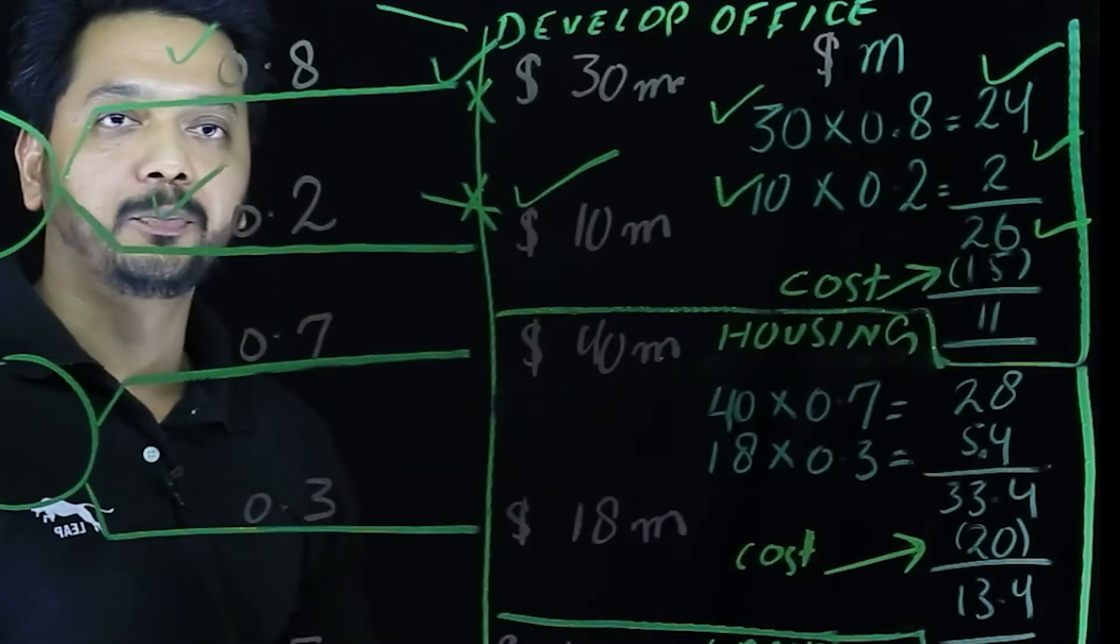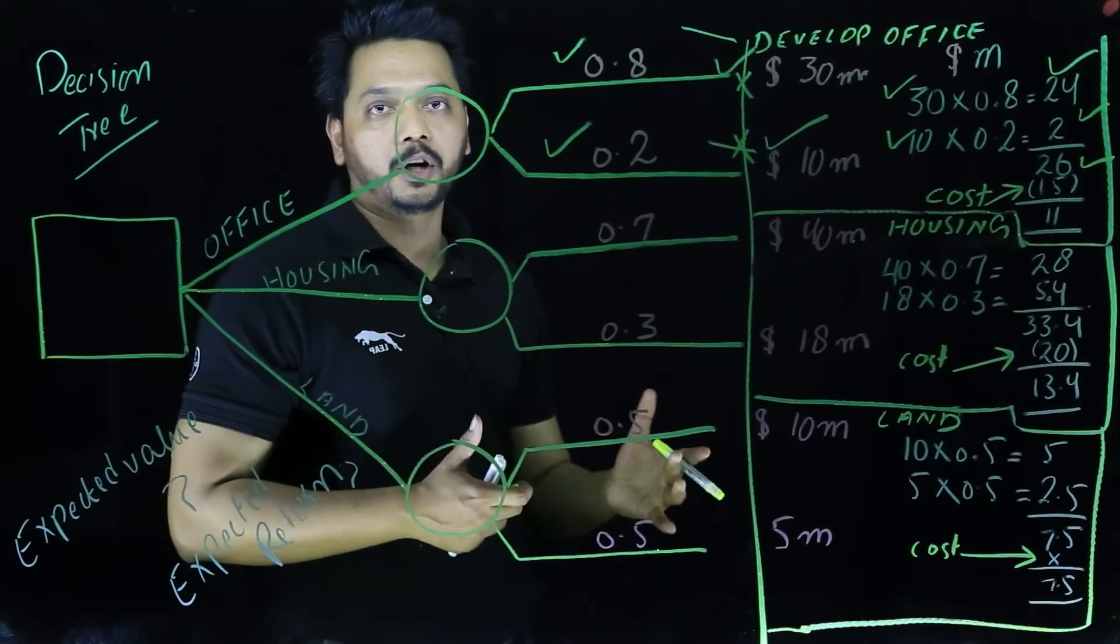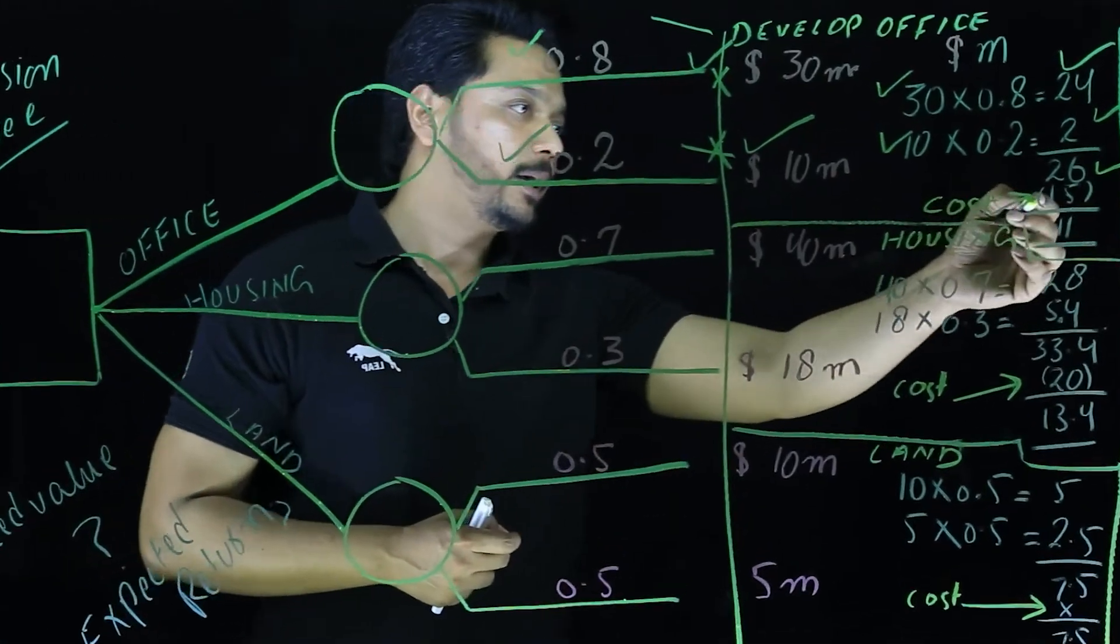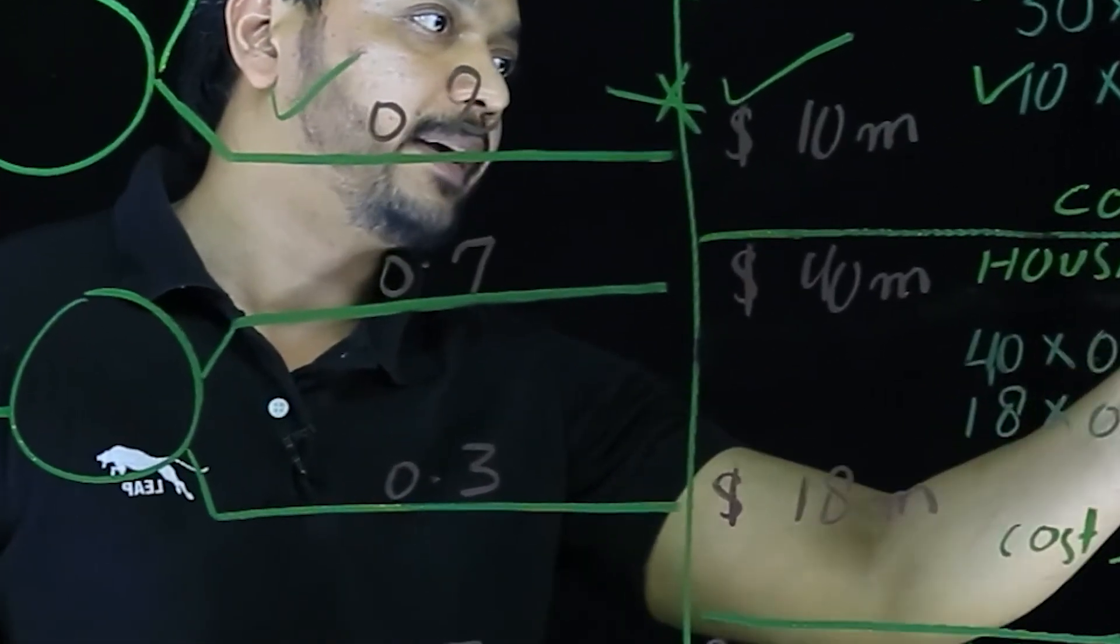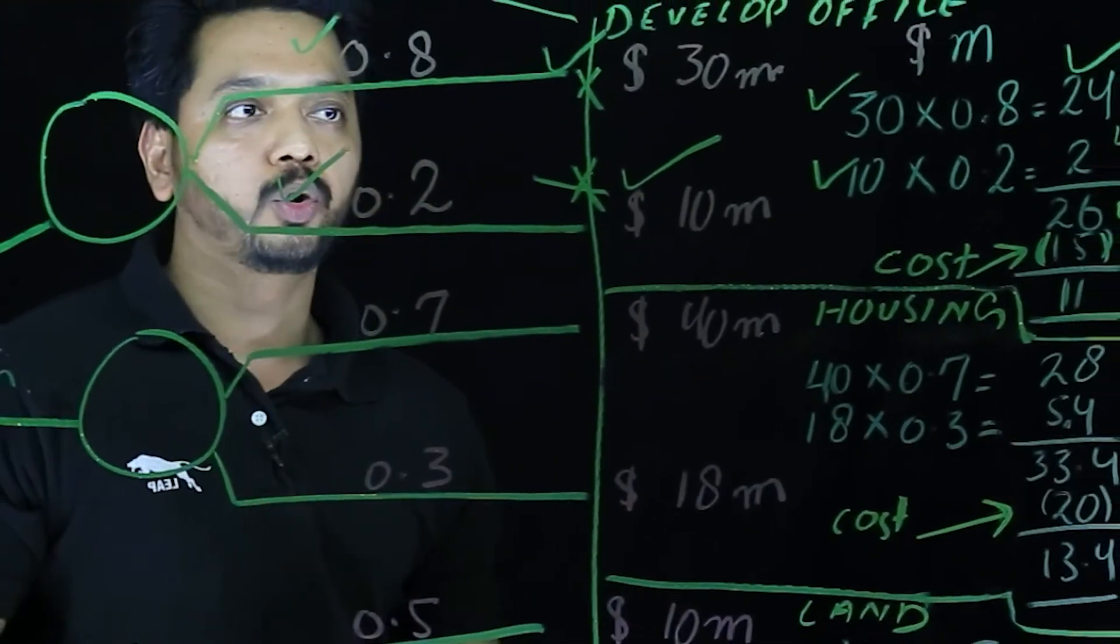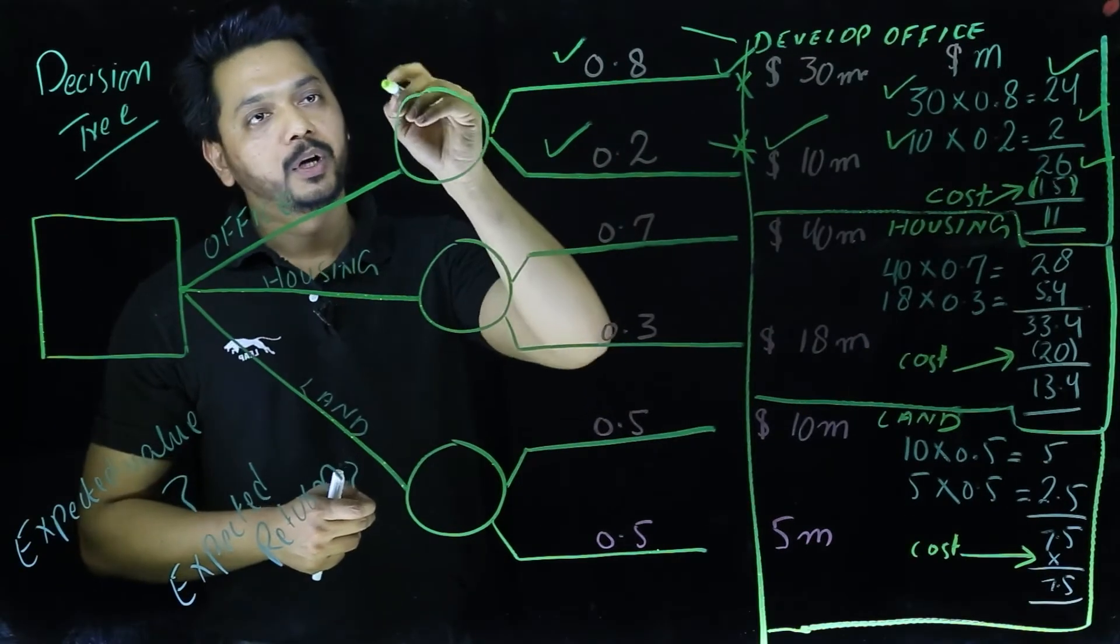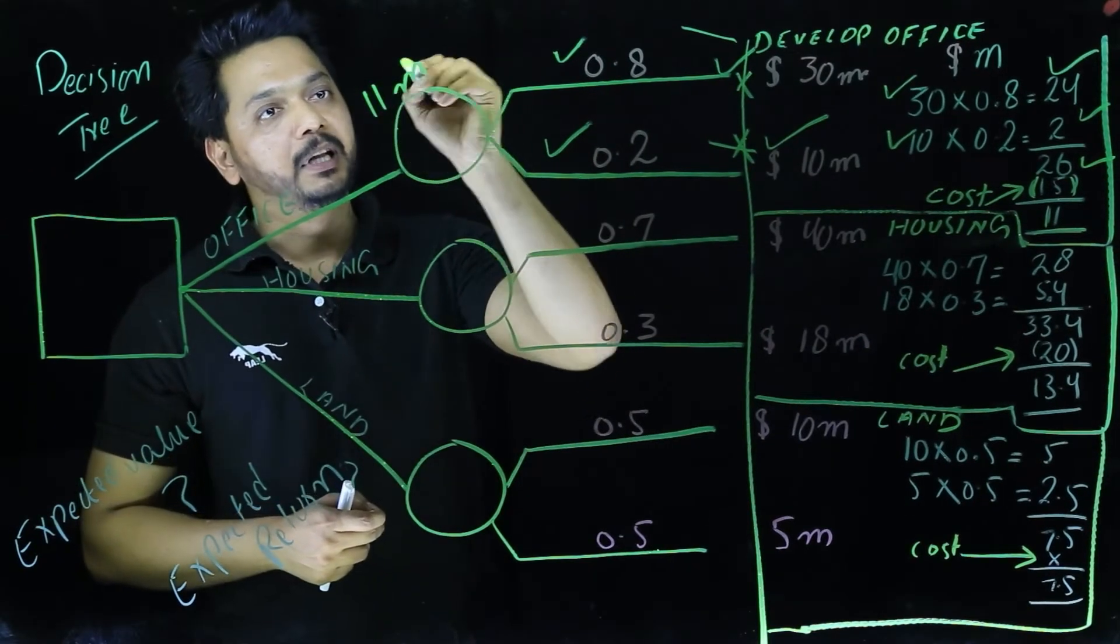Now here it comes $26 million, and the cost, the capital cost which is given here, we'll deduct the capital cost going to be invested here, which will give them a sum of $11 million here. So we could say that this option number one would give them $11 million.